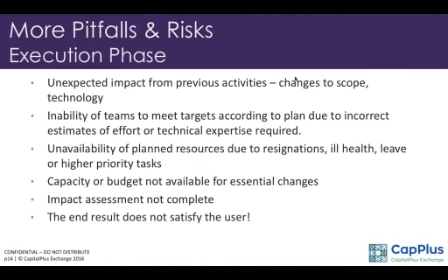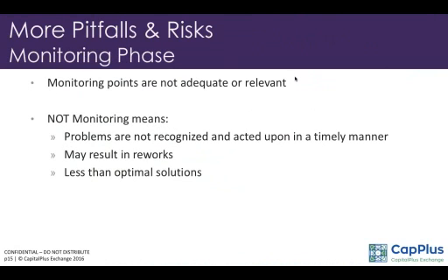You can't identify all risks during the initial planning phase, but it's necessary to keep on updating the risk assessment document on a regular basis to ensure that some of these risks are covered. I'll talk about more pitfalls, especially in the monitoring stage.